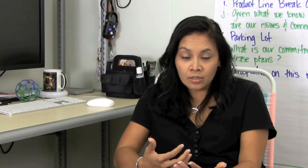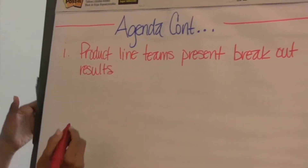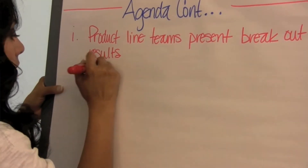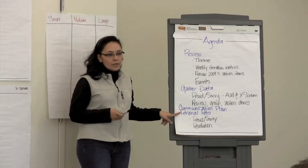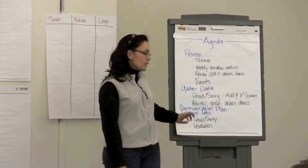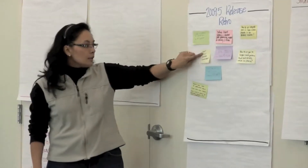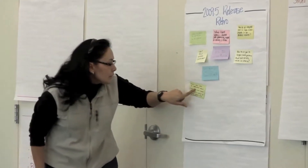As a Scrum Master for Rally, I facilitate the release planning meeting. The key to having a smooth release planning meeting is preparation, and it takes a lot of effort. I've learned a lot of lessons over the years. One of the steps I take is doing a retrospective with the team — discussing lessons learned from the previous release, taking actions to improve, and following up on those items in the next release. Sometimes those items become backlog items as well.